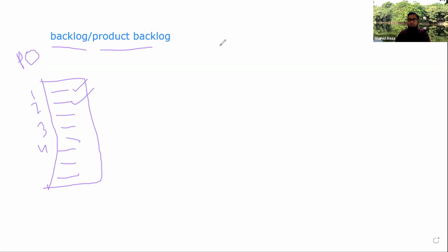As I mentioned, in Agile everything is time boxed. So the Agile team first sets a time box for the whole iteration. The length of an iteration, as people generally practice in the world, is from 1 week to 4 weeks. This is the maximum. We can use a 1 week duration or a maximum 4 week duration. This is the iteration time box. So at the beginning of the iteration, the product owner and the team leader, who is known as the Scrum Master,